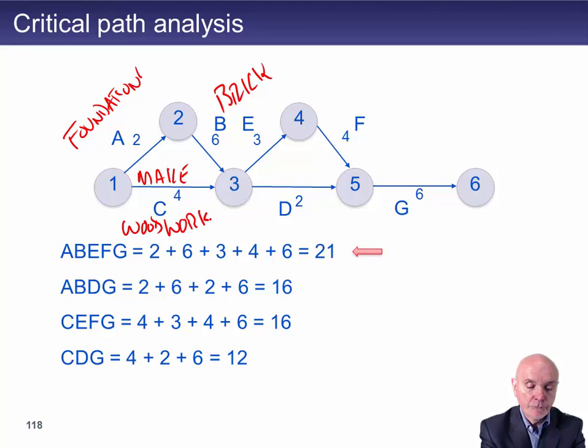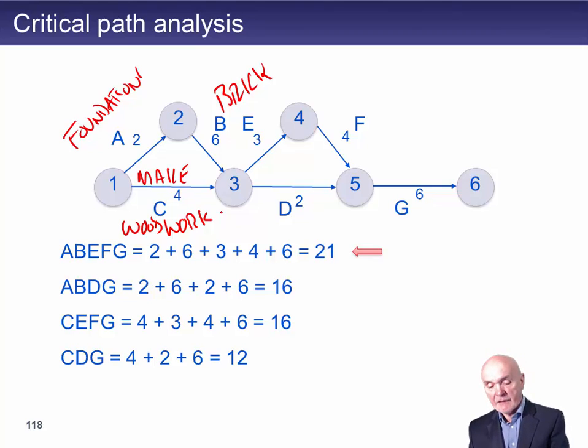Now, the sort of woodwork I'm thinking of can be done in a factory, off-site. It doesn't have to be done at the building site. What we're going to be doing is asking a factory to make the window frames, to make the doors and the door frames, and also to make the roof trusses.